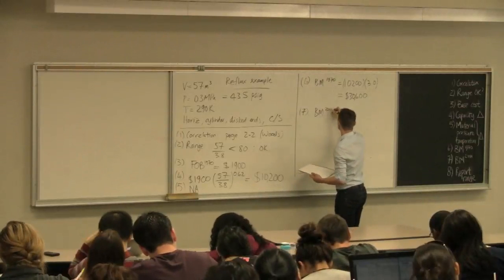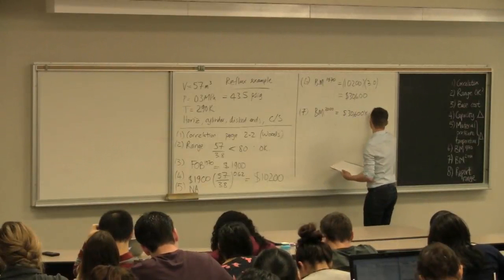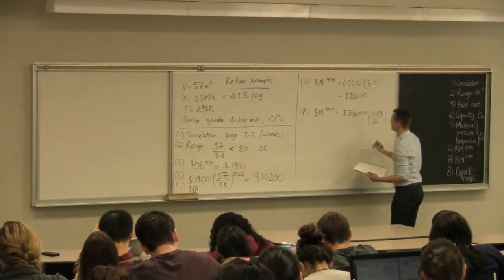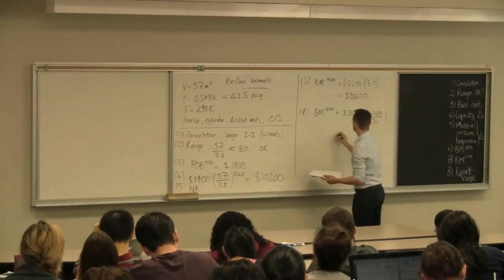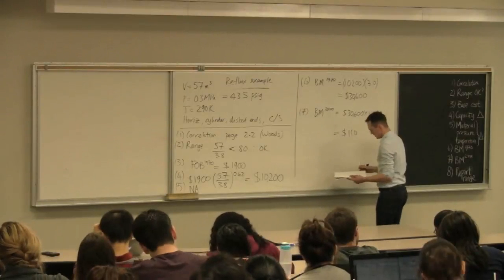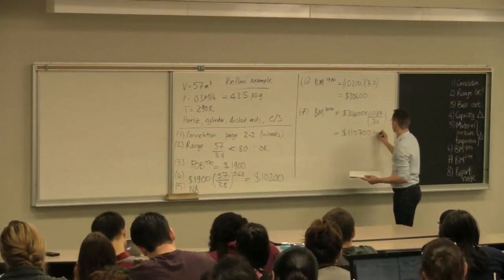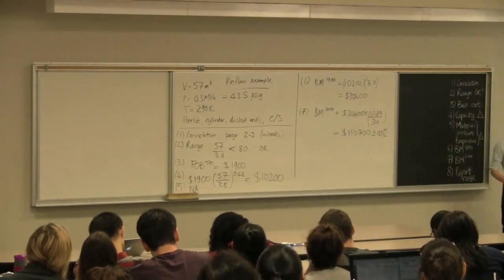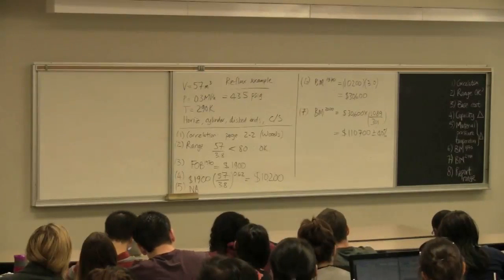We'll use the Marshall and Swift index for 2000, then that's 30,600 times 1089 divided by 301, the ratio of the 2000 to 1970 index values, which gets you a cost of 110,700. So quite a bit of money just for the little reflux drum of the size of the distillation column.